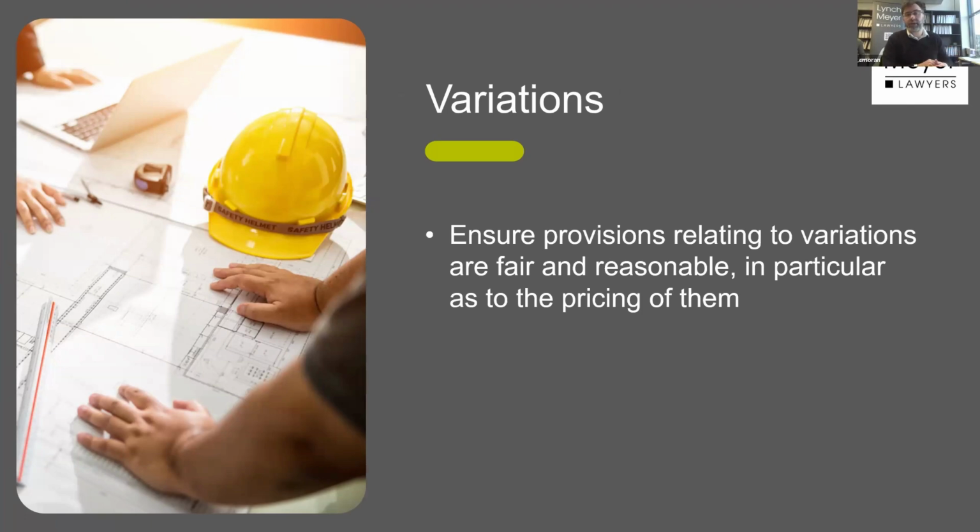Variations, of course. You get all sorts of different wording as to variation clauses. Turn your mind to how it will work. Often people will want a little bit more locked-in processes, so it'll be: you have to provide a quote, and the quote needs to be accepted. That's often the dream, but the nature of construction projects is that no matter what variation terms are included in a contract, they rarely seem to get followed.